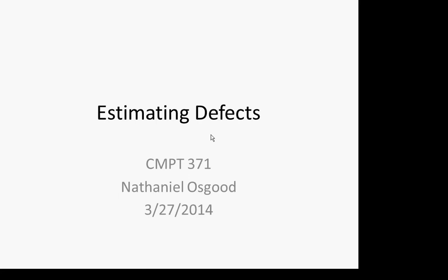Why could a small number of defects in the defect database be a bad thing? Could be that your detection methodology is horrible. Yeah, it could be you're very ineffective at doing testing. You haven't been really serious about it. You haven't really created test cases to put it through its paces. You're covering a very small fraction of the code. And you've only detected a very small number of bugs, but there's a much larger set still out there. Latent bugs, just waiting to afflict your system when it's demoed to the user or to the prof or what have you.